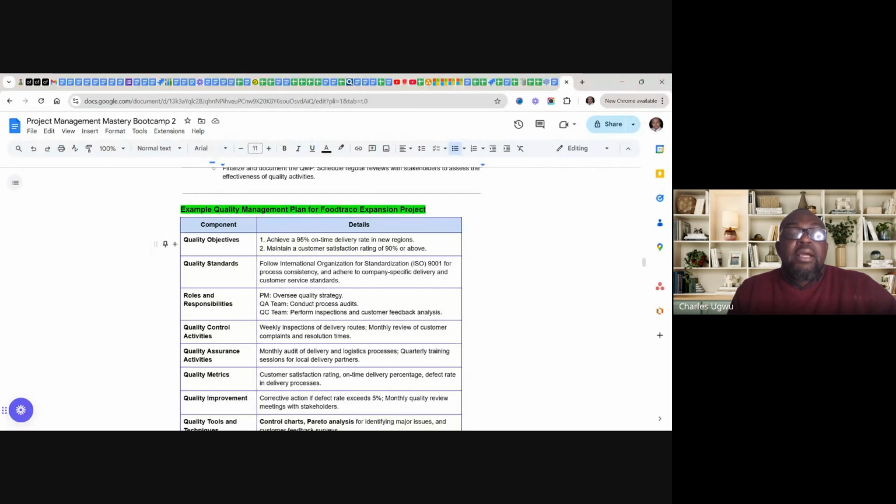From the components, number one is quality objective: achieve a 95% on-time delivery rate in new regions. Two, maintain a customer satisfaction rating of 90% and above.